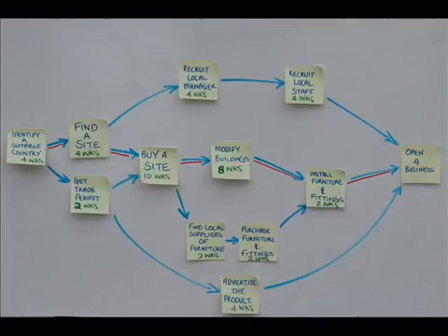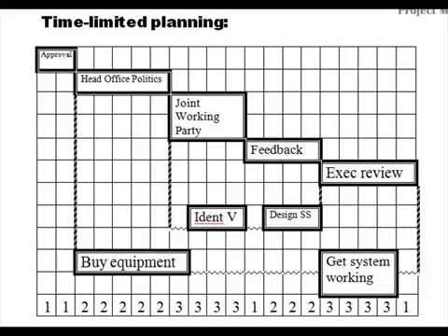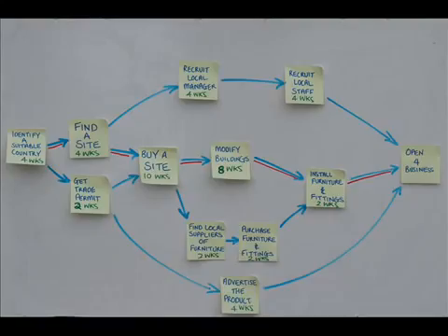This allows you to find the longest path, or the critical path. But also, more importantly, it's the heart of all your planning, because this is when you decide how you're going to actually do the project. So this is a network diagram, absolutely essential. Do not jump straight to a Gantt chart, but do a network diagram first.